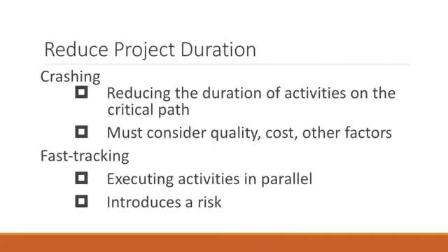Then what you guys kind of start thinking is that, well, that's 2 weeks of work. What if I hire this person full-time? It's probably going to be the same amount of money that I was already spending, but what I'm going to get out of that is that my project is going to finish a week earlier. That's the trade-off analysis that you guys do, and that's what crashing actually alludes to.